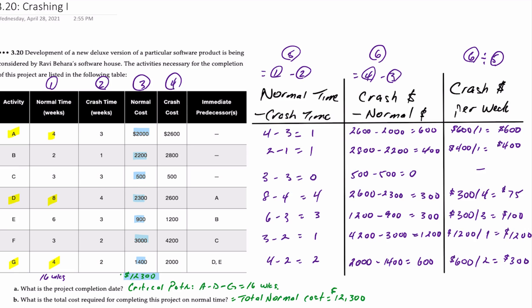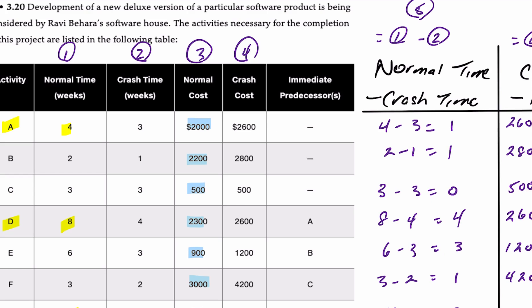We've been given a set of seven activities along with their normal time, and we're also presented with the crash time. The crash time represents the absolute minimum amount of time the activity can take. We're also presented with the normal cost — for example, activity A takes four weeks at a cost of $2,000. The crash cost is the cost to complete the activity in the reduced time, so if activity A were completed in three weeks that would cost $2,600. We're also provided with the immediate predecessors for all the tasks.